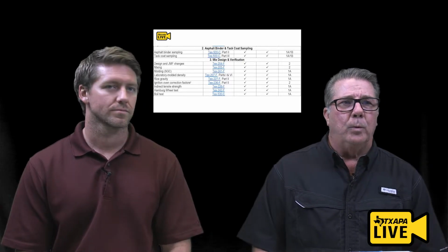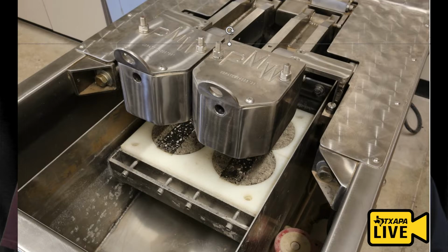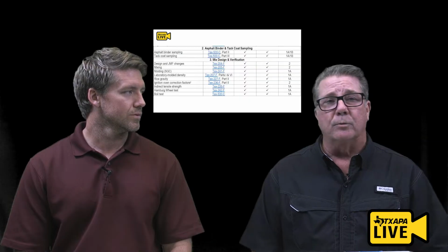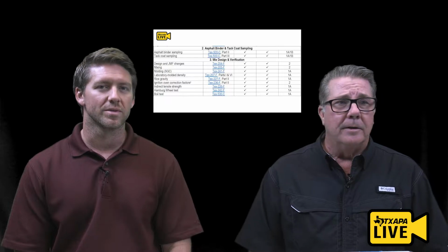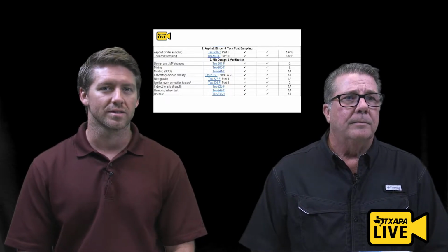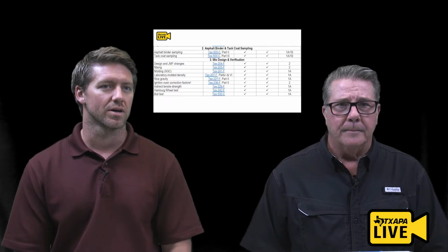So we got the Hamburg wheel test also here for the mix design and verification. So the Hamburg, Materials and Tests can perform the Hamburg. Yes. Or we have other individuals that are certified to be able to run the Hamburg. Is that correct? That's correct. So we have a material producer list. I believe there's around 60 certified machines on the list.